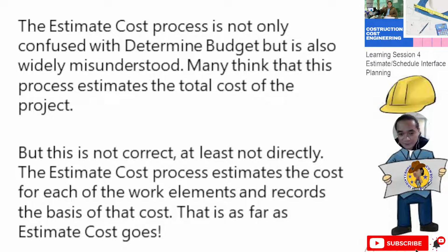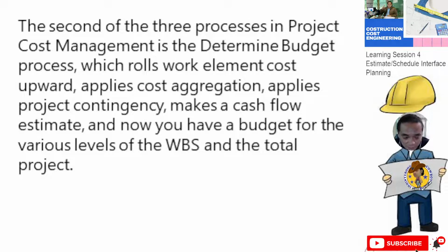Okay, so this is the difference of estimate and budget. But this is not correct, at least not directly. The estimate cost process estimates the cost for each of the work elements and records the basis of the cost. That is as far as the estimate cost goes.